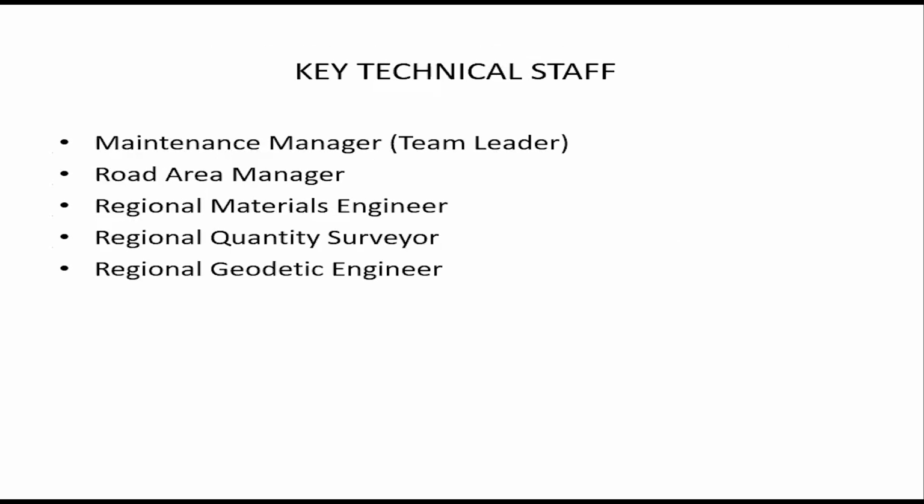Now, because normally line diagrams are done in the regions, the key technical staff are: the maintenance manager, who is deemed to be the team leader. Then we have the road area manager, regional materials engineer, regional quantity surveyor, and then regional geodetic engineer. All these people are very, very relevant in the project preparation or the line diagram preparation.